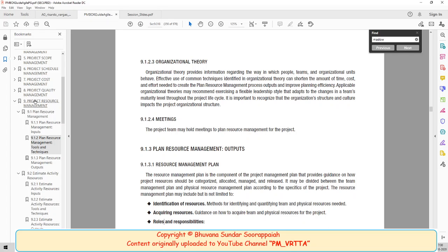And you know that when you are doing this in monsoon season, the probability of rain is heavy. Generally in summer, it will take 3 days for the pots that you make to bake in the heavy sunshine. So that's a minimum of 3 days I need. Below 3 days, even if you give super duper sunshine, it will not be enough. 3 days, so that is your optimistic estimate.